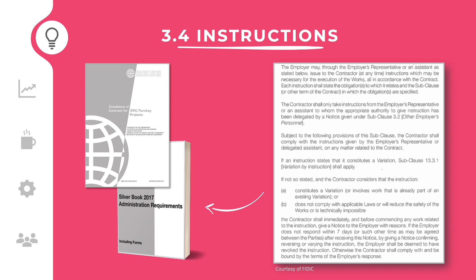To manage the contract in a clear and transparent way, the employer requirements should have an administration requirements section. Such a document describes the obligations about which forms to use, the workflow process, meetings to be held, and reporting. This module is about the instructions which the employer's representative can issue under sub-clause 3.4 of the general conditions.